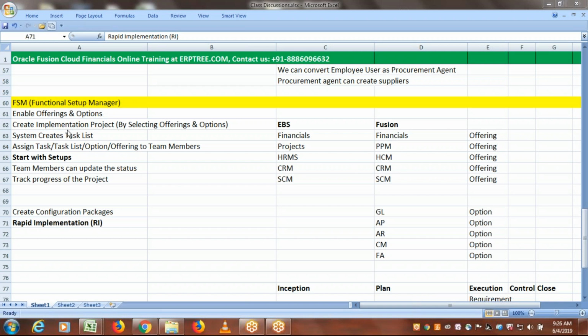When you are doing the implementation, how many implementation projects do we have to create in the system? That totally depends on a team decision. The best thing you could do is, if you are doing the implementation for say 5 countries, for each country you can create a separate implementation project. That means you are planning to manage the setups country wise. There is a benefit also if you create country wise, that you will understand once we start doing the setups. I can explain better at that time, that would be easy for you.